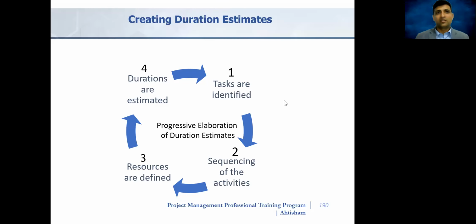Estimate activity duration is an iterative process. It is done throughout the project lifecycle, and duration estimate is progressively elaborated. As an example, as a result of progressive elaboration of scope, we may identify more design features. This shall also improve the accuracy of the estimates.